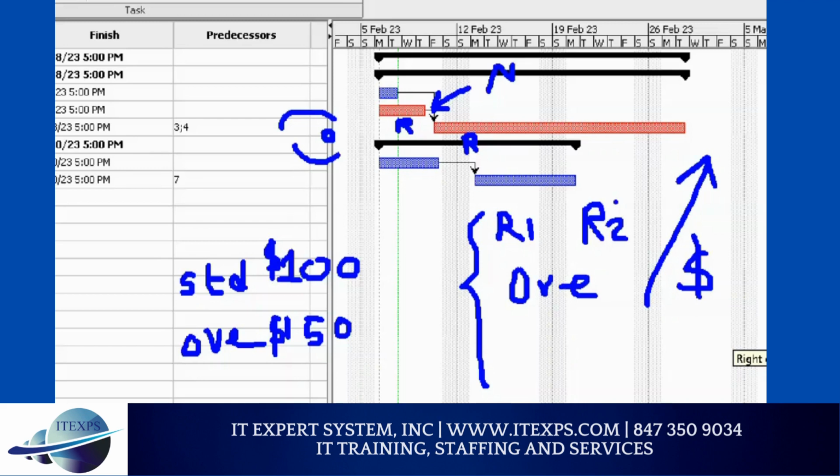Come on, there are a lot of options. Yes, Bill, go ahead. Can you allot the resources from the other task to this task? Nice, very nice. You can say, guys, you're done here. Can you start working here? So if two people work, this is called compression. Now suddenly this activity takes a little less time because this resource can work.